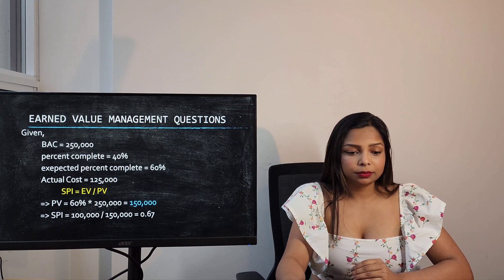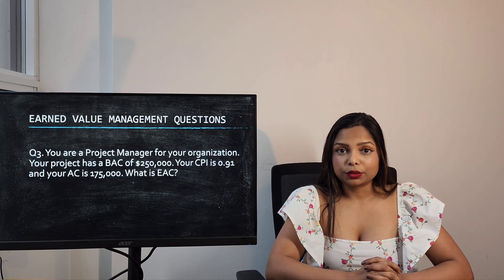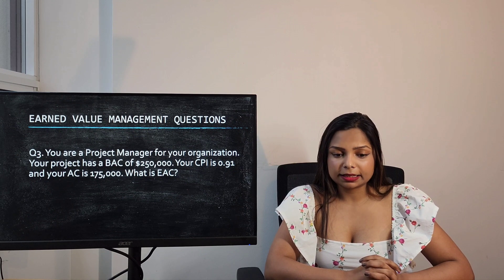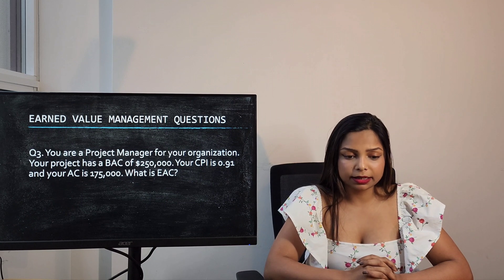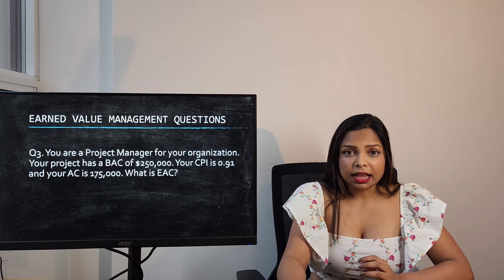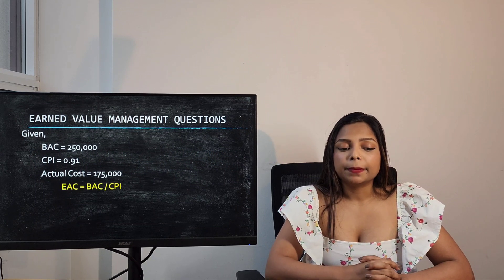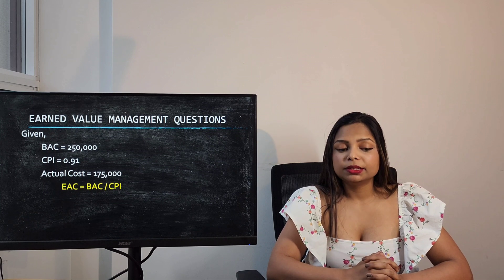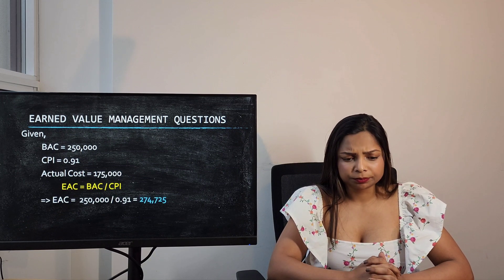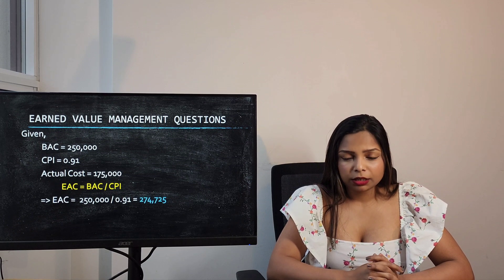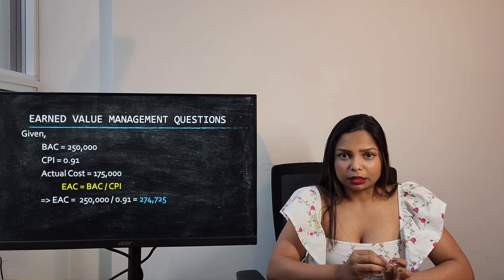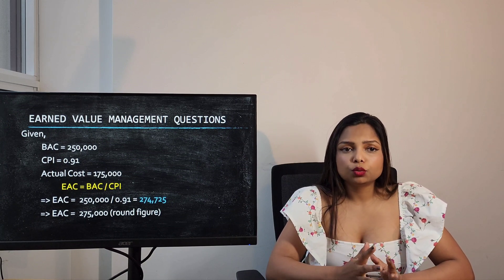Question 3: Your project has a BAC of $250,000, a Cost Performance Index of 0.91, and an Actual Cost of $175,000. What is the Estimate at Completion? Using the standard formula — BAC divided by CPI — $250,000 divided by 0.91 gives approximately $274,725. Rounding this value gives approximately $275,000.